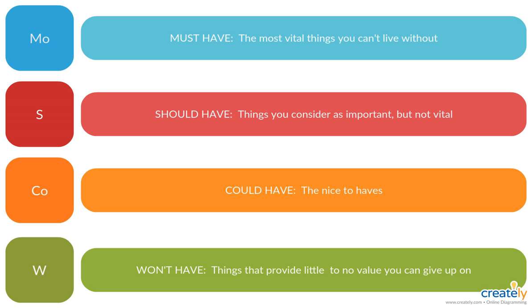It is what allows us to fight the good fight in terms of not letting perfect overwhelm the good enough in a project. So whenever change occurs, we always respond with this technique of ordering the priorities, and it's basically a couple of steps. The first step, which most people familiar with Scrum are already aware of, is assigning a priority level to everything in our backlog. There is a pretty standard way of doing this, and we subscribe to that as well. It's called the MoSCoW method, an acronym for must have, should have, could have.